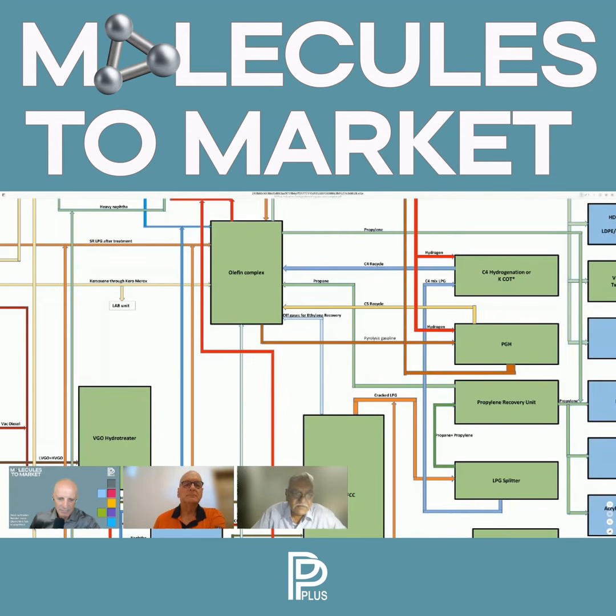And these licensors are also quite worried about their technology, so they come with some ring-fencing clauses and those kind of requirements. So I think it becomes pertinent that once you get into petrochemicals, the mode of implementation has to be different. One has to go through the technology selection process. Now, this impacts the project schedule and so many other things.